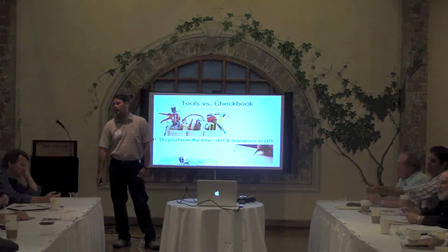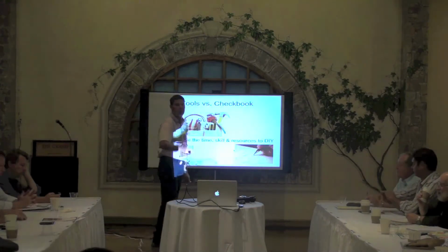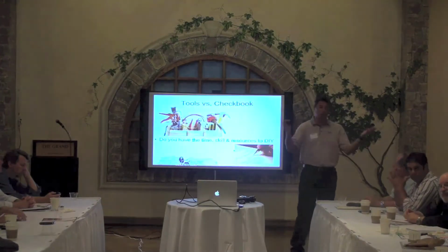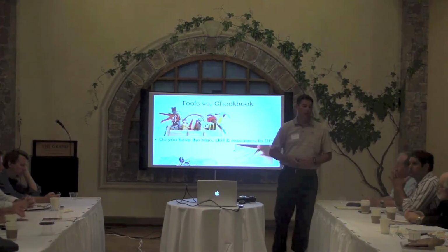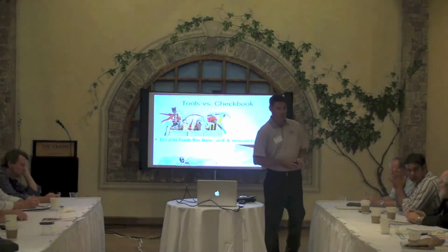It really depends. The question was, he's heard 20%, sir, for the buffer to add on if you come up with a $40,000 estimate. Throw another 8 grand on top of it. Another word they use is contingency. Contingency, exactly. It's contingency on your estimate.